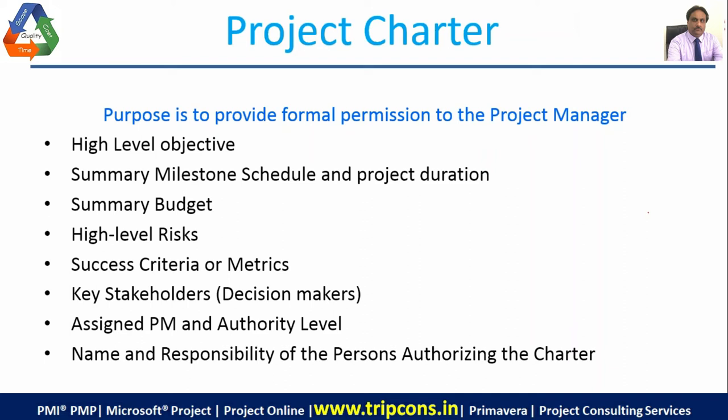When you are building something, you have got to evaluate what the functional level is. The functional level is something which you can predetermine. What is the success criteria of the pulse polio project? If a country is undertaking this project, what is the success criteria? The success criteria is that after a predetermined period of time, no child should be found having the polio virus. So you can set a success criteria for your project also, which will be mentioned in the charter document.